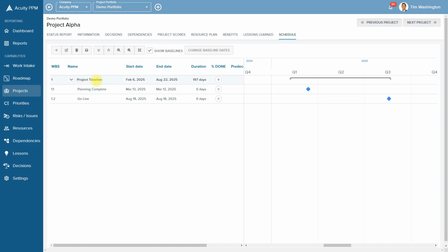The project timeline is by default set to a manual schedule. We would strongly recommend that you look at the user guide to understand the distinction between a manual schedule and an auto schedule. Auto schedule takes into account task dependencies and looks at the earliest start, the latest finish, etc.